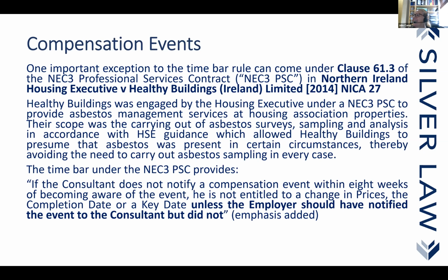That would be more than sufficient. It would be useful to put behind it the following is an approximate assessment at the moment. But you've now notified, you've told them what the event is, you've told them basically what the costs will be, what the nature of costs that are going to be incurred and why. That would suffice.